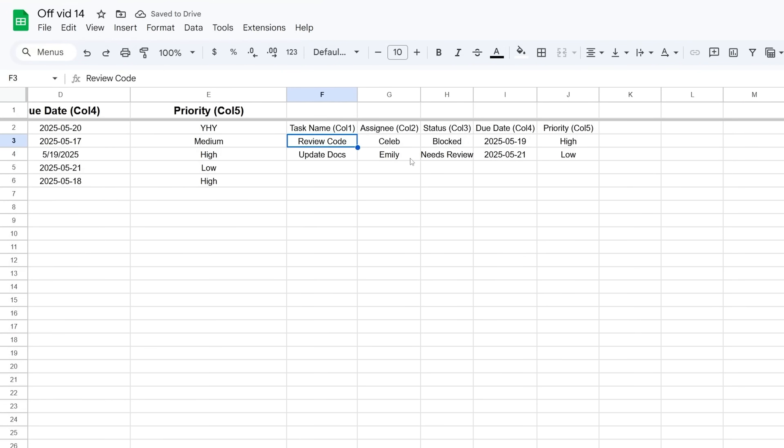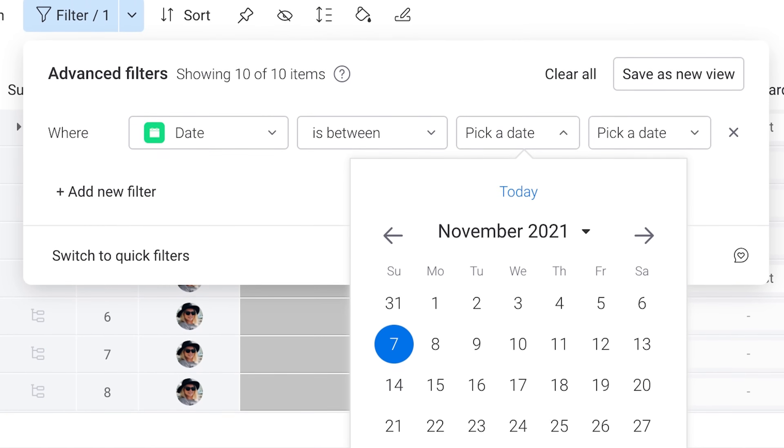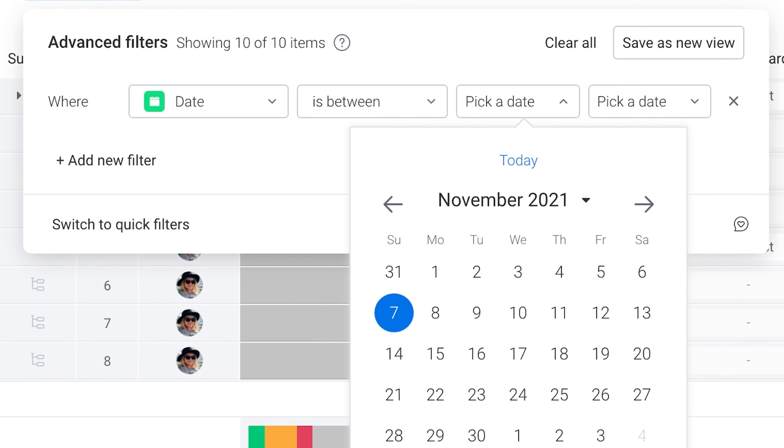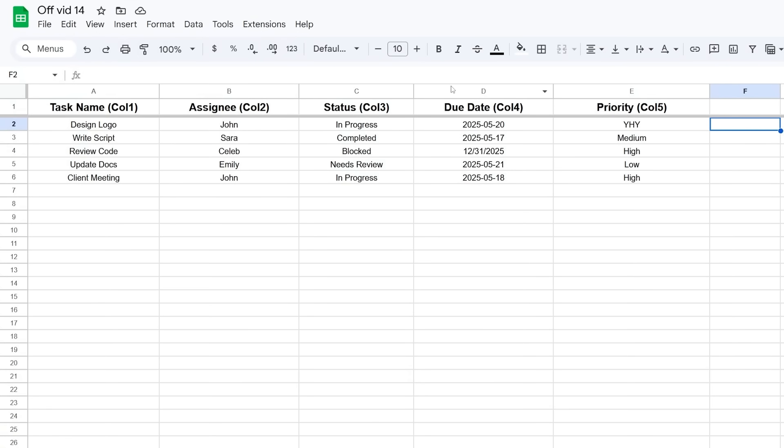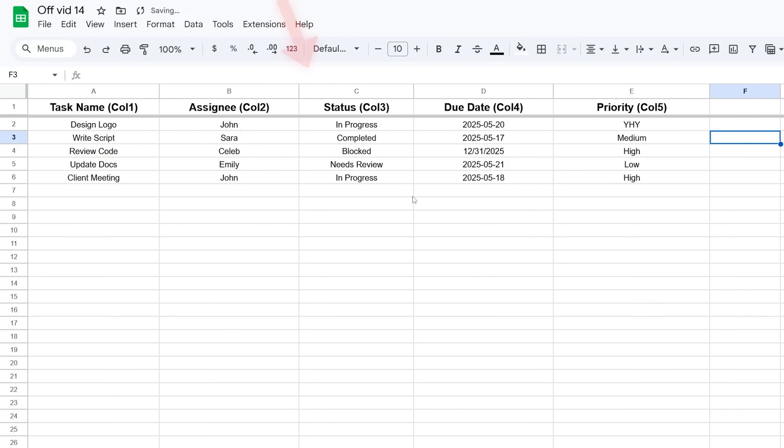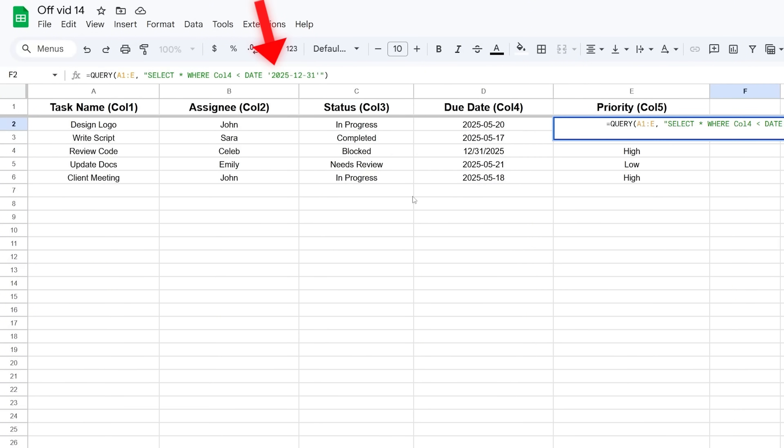You can also filter dates. This is super useful for seeing what's due soon. If your due date is in Column 4, you could filter for tasks due before a certain date like this: SELECT * WHERE Col4 < date '...', and you put the date in single quotes. The four-digit year, two-digit month, two-digit day format is how you tell QUERY you're giving it a date.